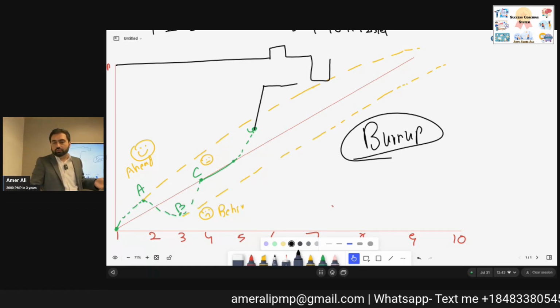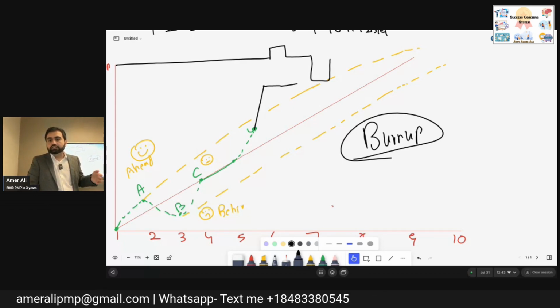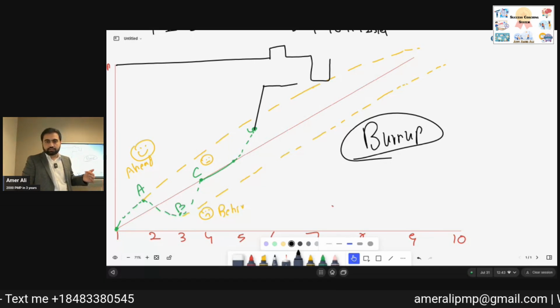When you are ahead or behind, Salman, if you are ahead of schedule, this means SPI is greater than 1. When you are behind, it shows SPI less than 1. Okay?